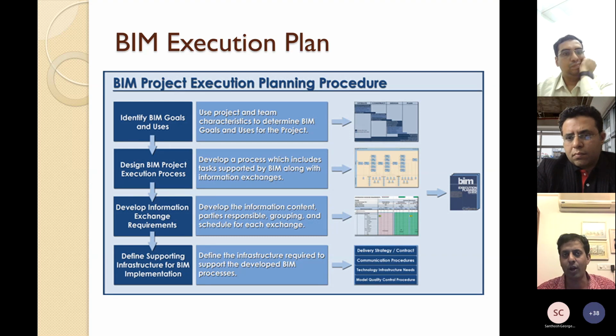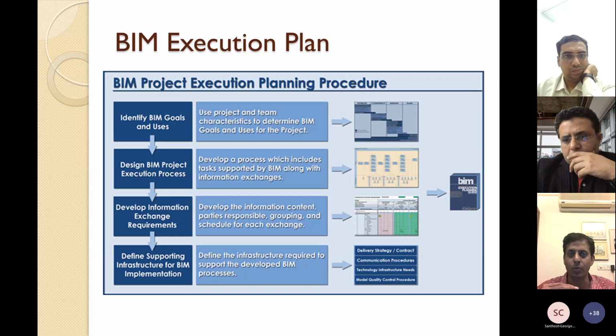Right? So it's very important to have a meeting between the top-down and bottom-up approaches: what top management wants to see, and what's capable in terms of the skills, budget and tools available from the people on the field who are actually implementing these. Come to a happy mean in terms of what can be implemented, and use that as a stepping stone to build outwards. Maybe start with very simple implementations up front, where you're essentially only bringing a few geometric models together and detecting clashes, to much more complicated implementations as capability is built in, right?